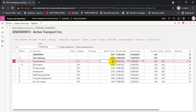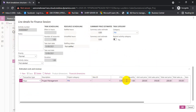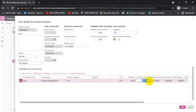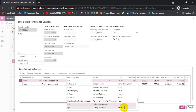On the 1.1 Finance Session, we have multiple choices to add transactions. For example, our Project Manager will spend 20 hours — the unit cost price will come automatically from the settings as per the PM category, say $200 per hour. The same rule applies for the sale price — if the PM category is utilized, $350 will be the sale price. We can also add this manually.